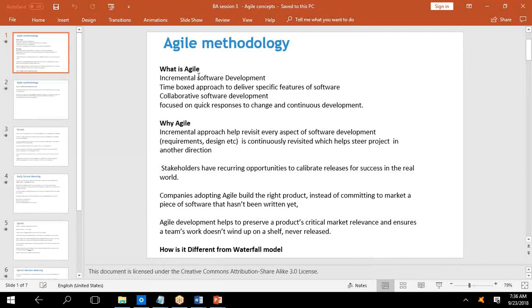When the development starts, you will do detailed requirements, and that is agile. You understand the difference? In waterfall and iterative, you will do detailed requirements during the BA requirements activity. So when it is your job to hand over the requirements to design, it should be detailed enough in waterfall and iterative. Whereas in agile, it will not be detailed; it will just be high level. Got it?